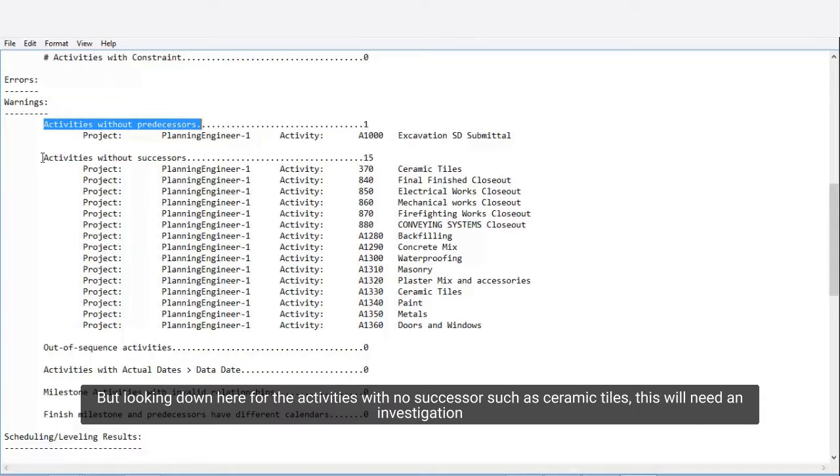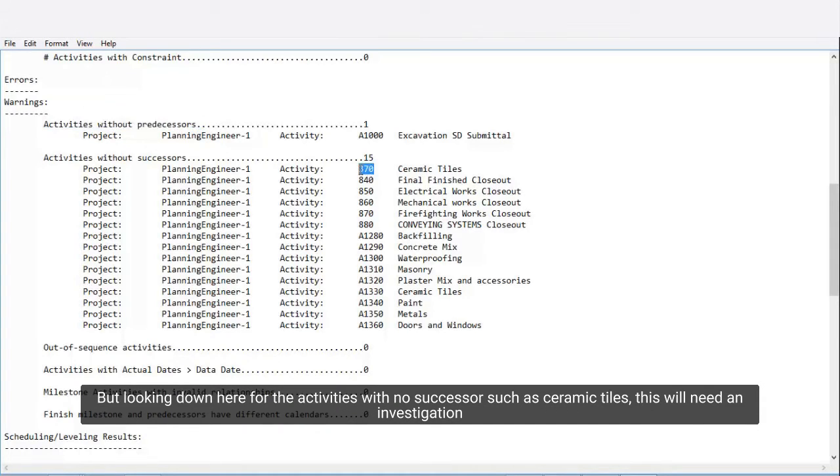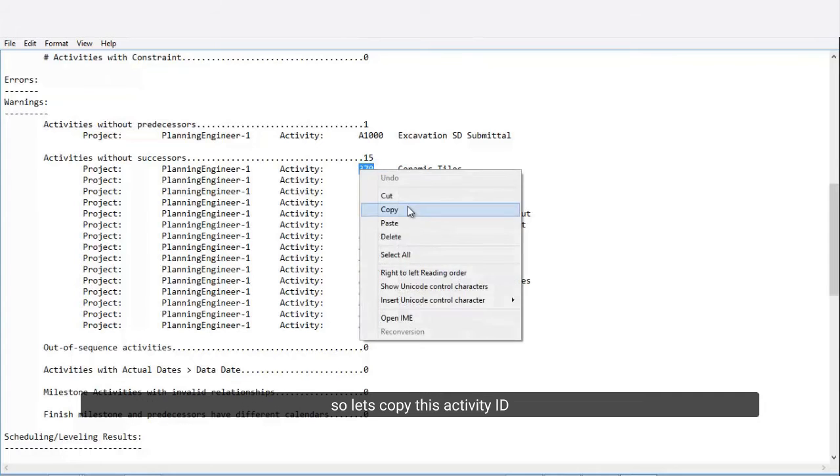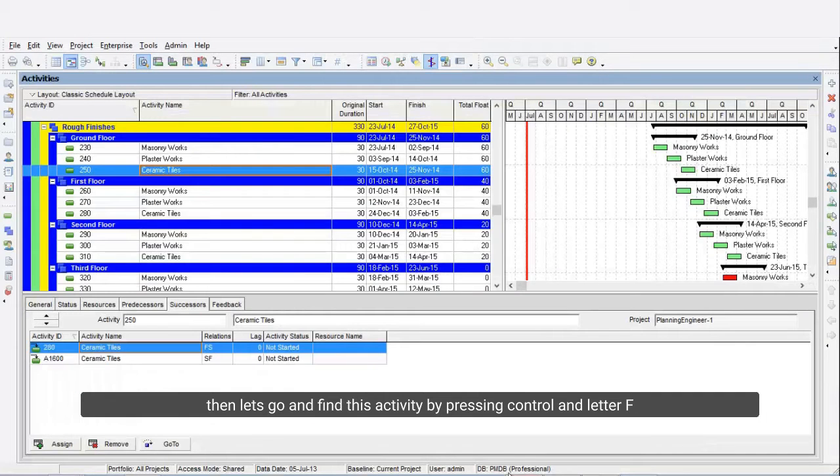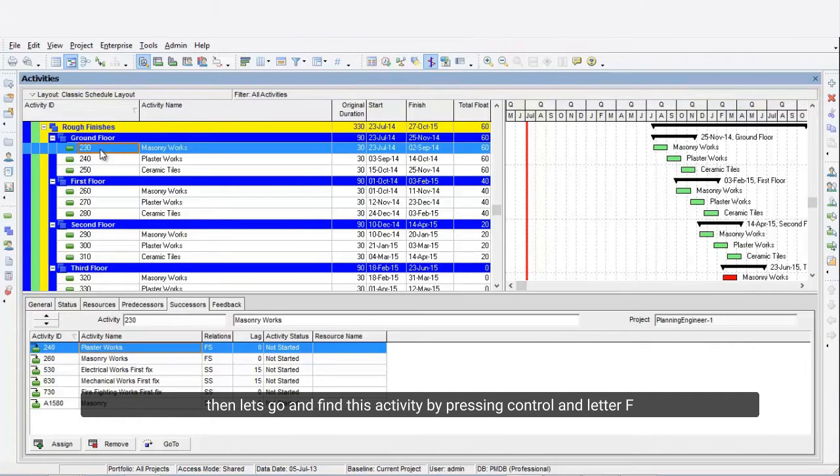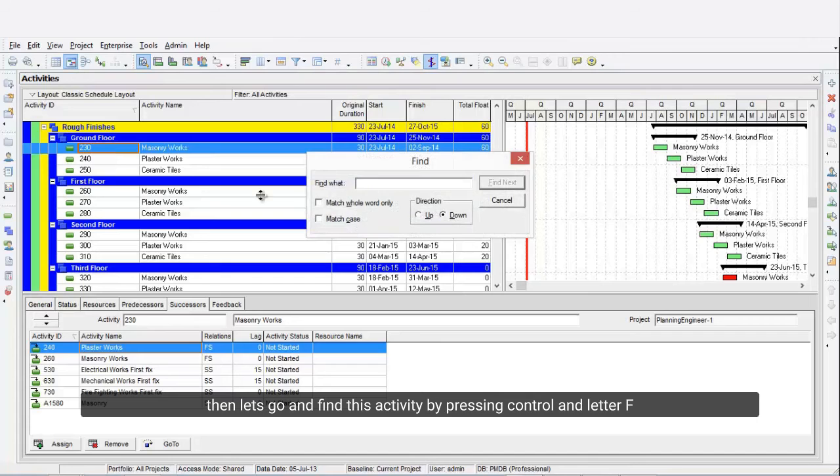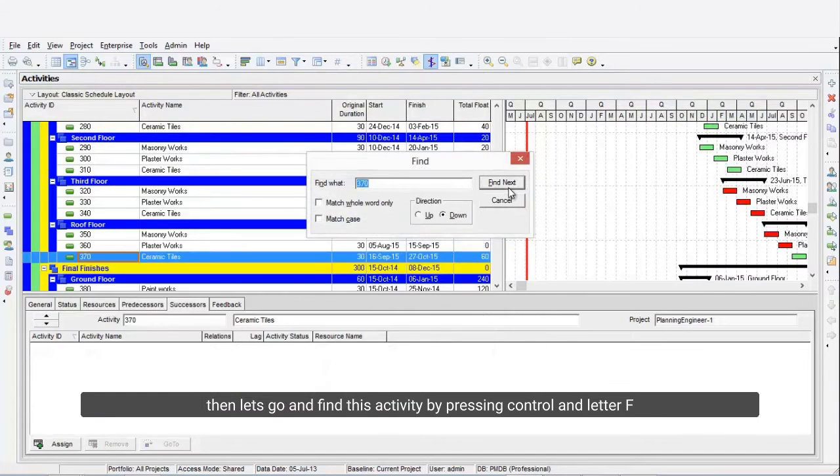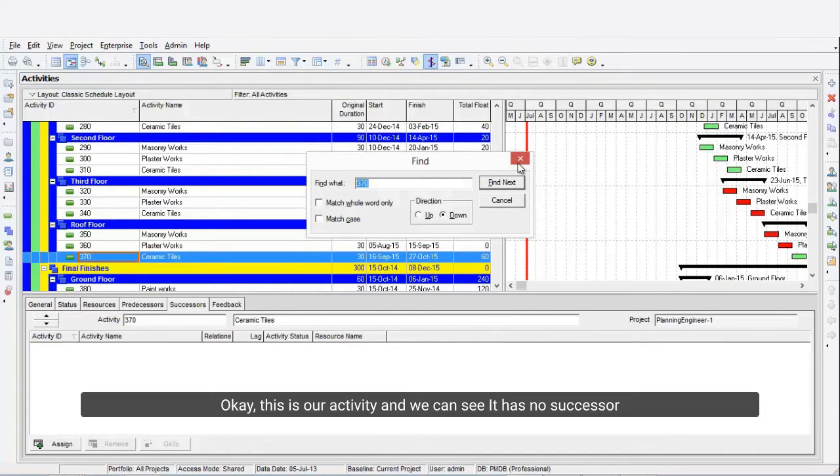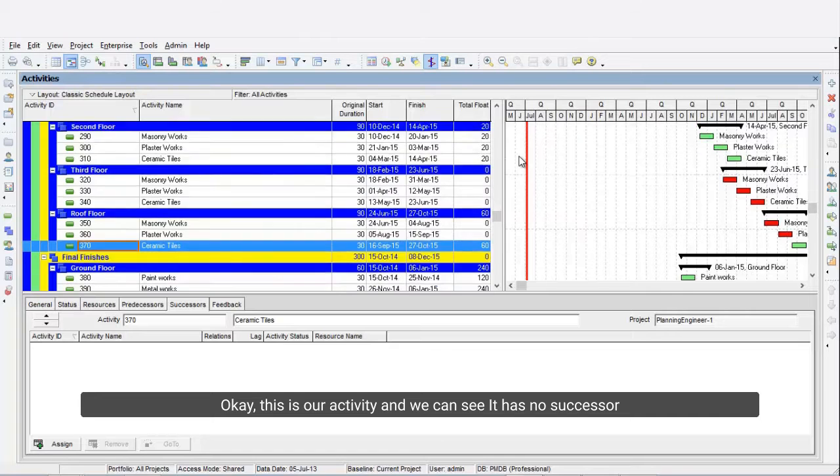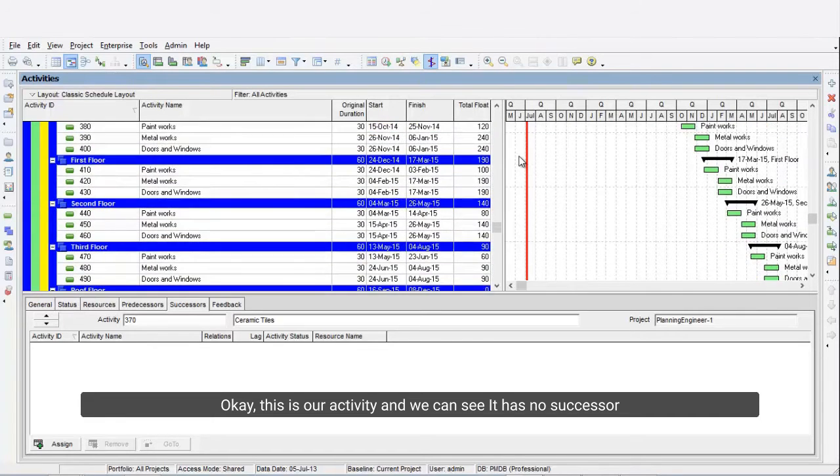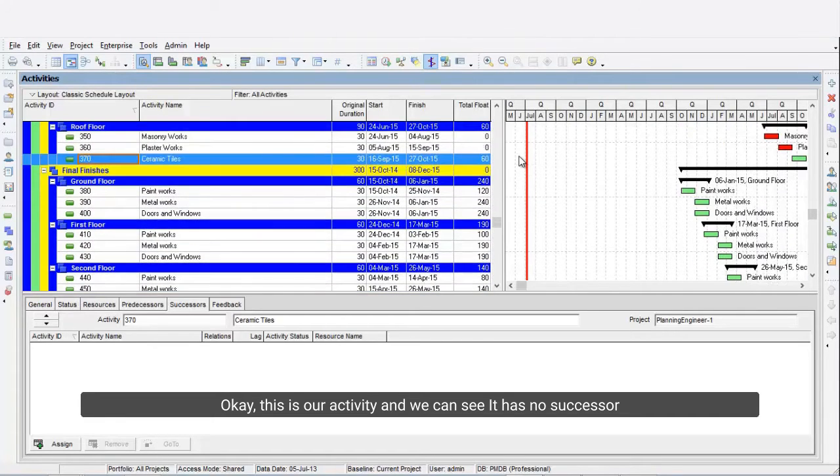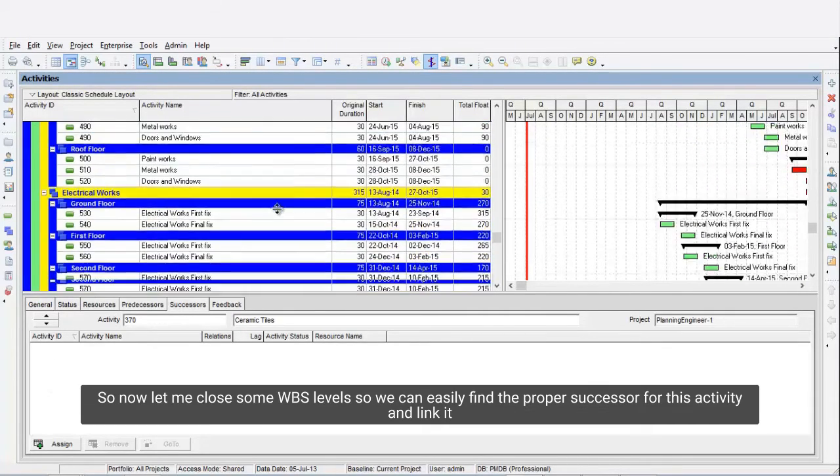But looking down here for activities with no successors, such as Ceramic Tiles, this will need an investigation. Let's copy this activity ID. Then let's go and find this activity by pressing Ctrl and letter F. Okay, this is our activity and we can see it has no successor.